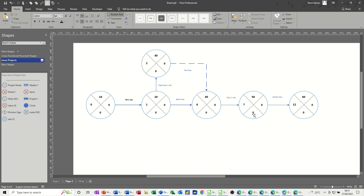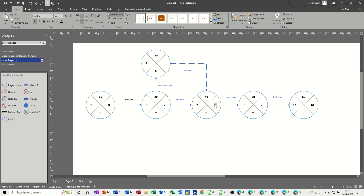Now you've got that, what you need to do is work out the float. You start off at the end — that's 12 minutes. Then you take off this duration, so that's going to be seven. You've got to take these two from each other — seven from seven is zero. That's one minute, so that's going to be six. Six from six is zero. Then we've got this little arrow where there's no time — it's still six. We go back and put six on there — no time, six. You take two from six, which gives you four. So that's your float — four. You've got four minutes float time, so the whole task is five minutes and it can go on any time during that. Taking five minutes off this six gives us one — one from one is zero. And then we're back to the beginning. You can see all the zeros — that is your critical path.